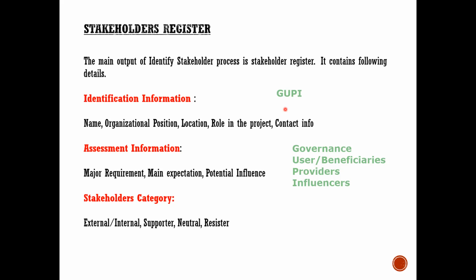So New Holland Tractor sponsored free ITI training for all the eligible people. They paid for their ITI training. The people were trained, and later on absorbed also. They did not have any roadblock like this. They targeted the nuisance creators and created opportunities for them.